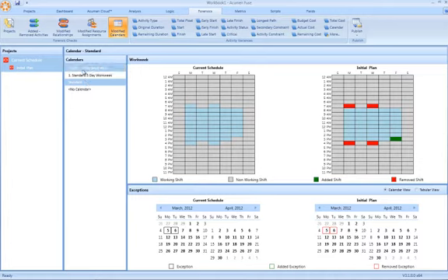So we get to select from the entire list of calendars present within the basis schedule, in this case the current schedule, and immediately we can look at differences between in this case the current schedule and the initial plan. And we can see that there are changes with regards to added and removed shifts. We can see that some shift time was removed in the current schedule relative to the initial plan here on Monday and Wednesday. Conversely, time was added on Friday afternoon.